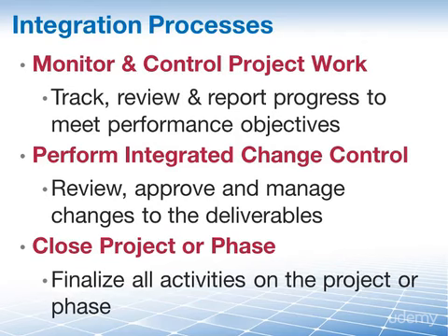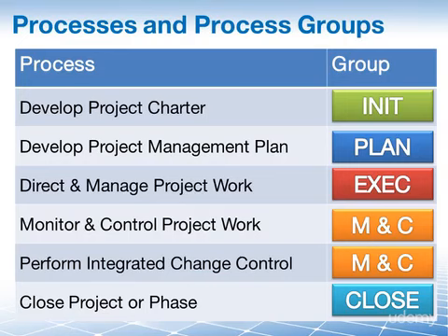project or phase. Project Integration Management is the only knowledge area in the PMBOK guide that has a process in every single process group. As you can see here, Develop Project Charter, this is in the Initiating process group. Develop Project Management Plan, well, the plan in the word is the dead giveaway there. This is in the Planning process group. Direct and manage project work, that is the executing process group. Monitor and control project work, as well as perform integrated change control, they are both in the monitoring and controlling process group.